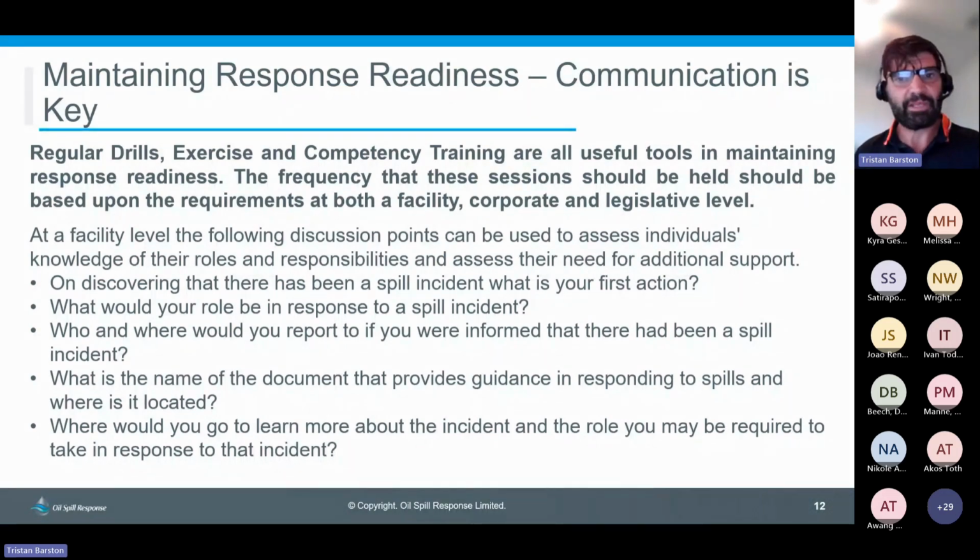So we had to come up with a second plan. It actually involved breaking down the equipment, putting it on smaller vehicles and moving it a different way. But obviously that had a huge impact on time. So what knock-on effect did that have on the overall response?